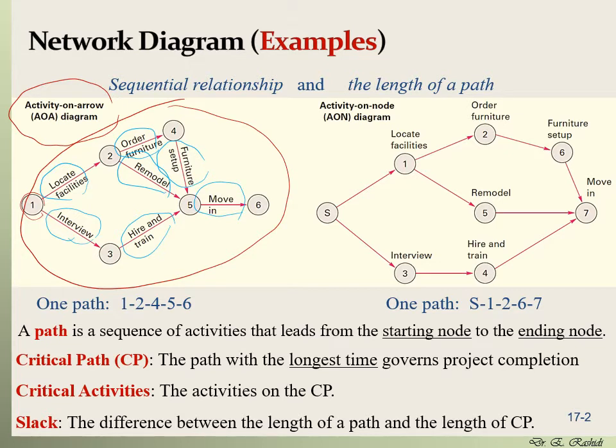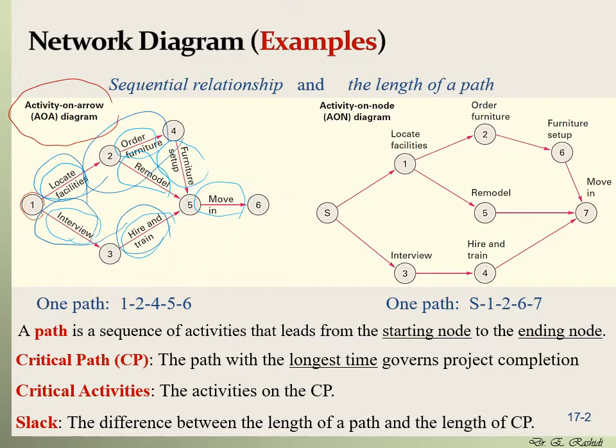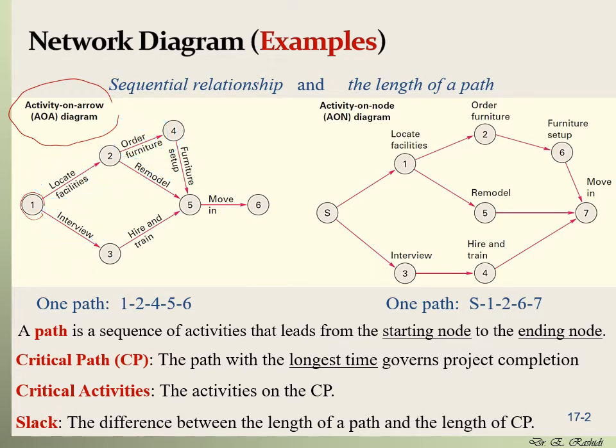So the precedence relationship between these activities holds true here. We cannot hire before we interview people, or we cannot move in before we locate the facility, order furniture and set up the furniture. So the precedence relationship must hold true in any type of diagram that we use.